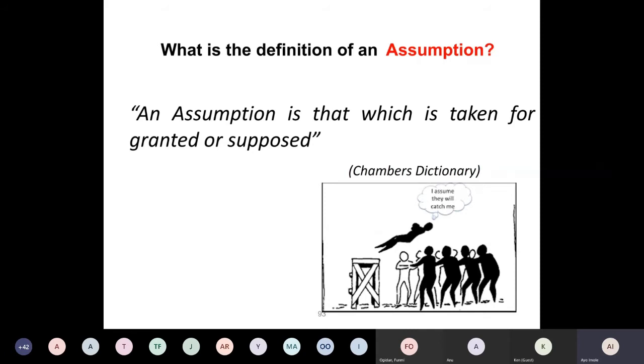Whenever we're talking about assumptions, there will be a lot of them. Another assumption you can have on a project, like your 1000 laptop migration that we spoke about, is that we assumed every one of the laptops is on Microsoft Office 2010 at the moment. If we assume that, we need to document that down, because I think 5 years ago we migrated everything to 2010. So we're saying that we're assuming.